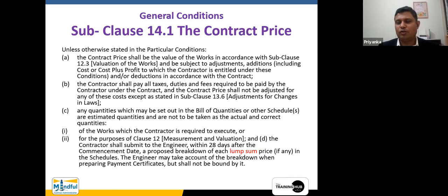Okay, that we know whenever there is a price in the BOQ that says LS or lump sum, you put a price for that one. This is basically appearing within the preliminaries portion, right? So you do a breakdown for that particular lump sum. At the time of tendering, you're asking this from the contractor: please give us this particular breakdown of this lump sum, in order for you to comprehend, from the eyes of a cost consultant, whether it is worth paying the contractor this particular lump sum.